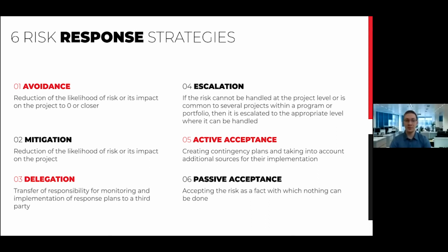If we work in a multi-project environment and find a risk common to several projects, or just cannot do anything with the risk at the project level, we have to transfer the responsibility for this risk to a higher level. This strategy is called escalation.